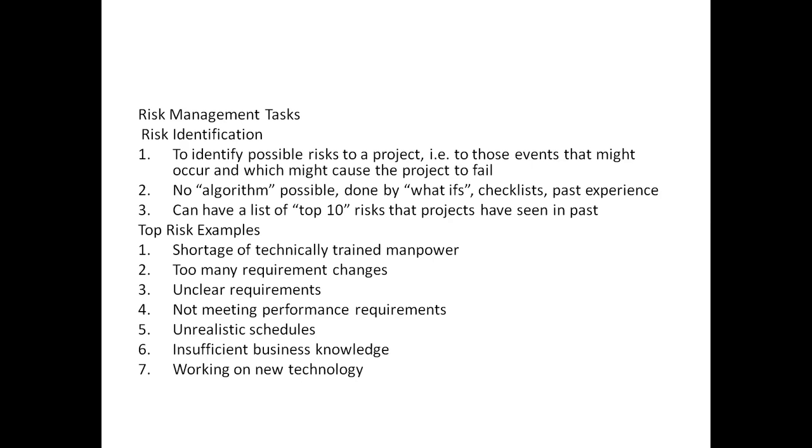Some of the risk items are personnel shortfalls, unrealistic schedules and budgets, developing the wrong software functions, developing the wrong user interface, gold plating, continuing streams of requirement changes, shortfalls in externally furnished components, shortfalls in externally performed tasks, real-time performance shortages, and suboptimal computer capabilities.